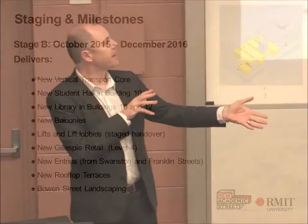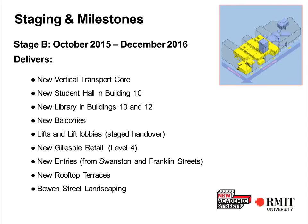The second phase of the project is really the main phase of the works, which will start in October. So from October this year till end of November, early December next year, we'll be doing the bulk of the work. So whilst we say that the NAS project goes for 2.5 years, the bulk of the work is really to be delivered by the end of next year. And that is the building 10, 12, 14 areas, which is the retail precinct down in level 4, the new student hub down in level 4, upgraded library facilities, which are going to be pretty amazing on levels 5 and 6,